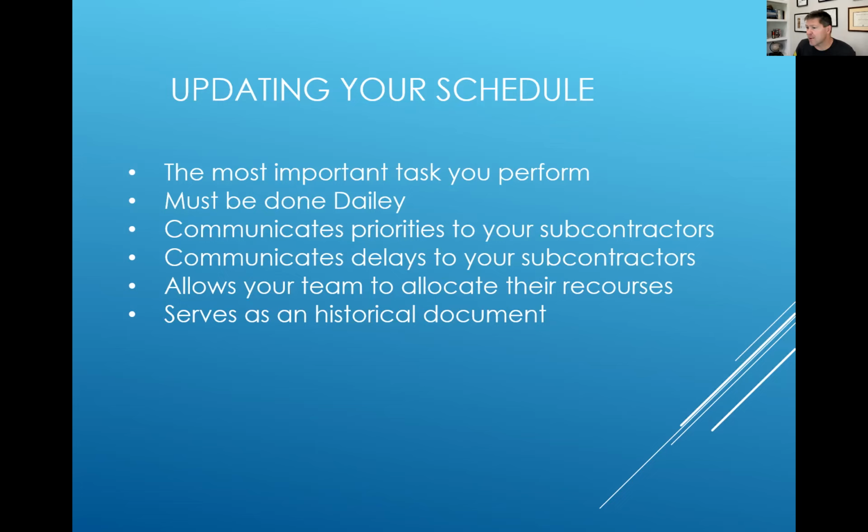Updating your schedule allows your team to allocate their resources. You may have a vendor that's got 4 crews. They're looking at their 4 schedules. If your schedule's never updated, they may not send you a crew until you call them and tell them that you're 100% ready for them. So if your schedule is always updated and your vendors know that, they're going to say, you know what, this schedule says they're ready. They're ready, because they always are. I'm sending a crew to them.